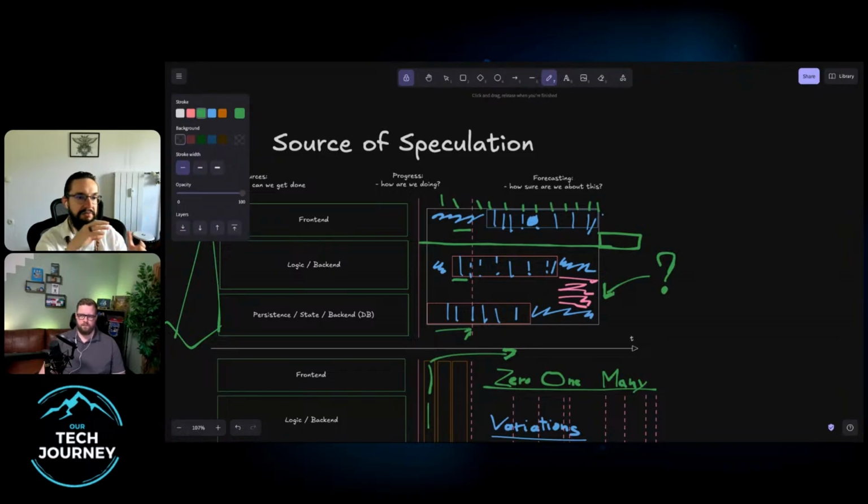So even if it's just about the kind of work where you say, well, I am skill complete, but we said I'm not allowed to review my own work, you should at least know what your reviewer is working on so that you can bring them in as soon as possible, ideally in parallel while you're working on it. So at the very least, you can pair program with your reviewer half time while you're building it, even if you can build it alone.